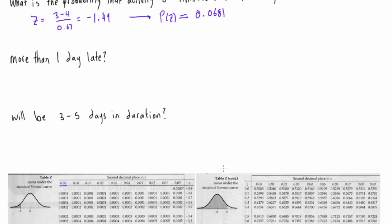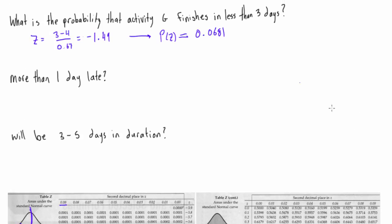What does that mean? The z-score table always gives you the probability of landing in the shaded area. Our mean was 4 and x was 3, so we label mu and x on the bell curve — it's a normal curve centered at 4 instead of 0. The shaded area represents a 6.81% chance of landing there, which is the area less than 3. That includes 2.5 days, 2 days, 1 day, and so on. So the probability that activity G finishes in less than three days is 6.81%.